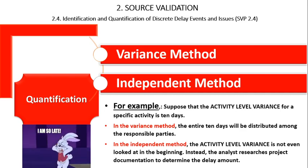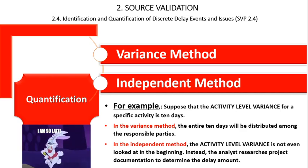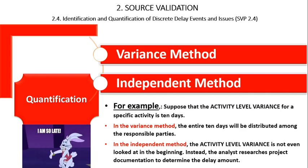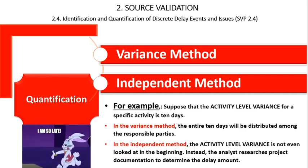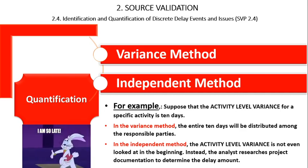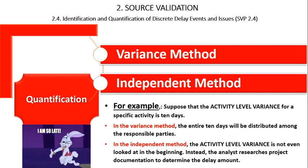Therefore, in the variance method, the analyst is guided to the delay amount by the amount of activity-level variance. On the other hand, in the independent method, the analyst does not review the activity-level variance, but relies on what is written in the documentation to make its determination of delay amount.